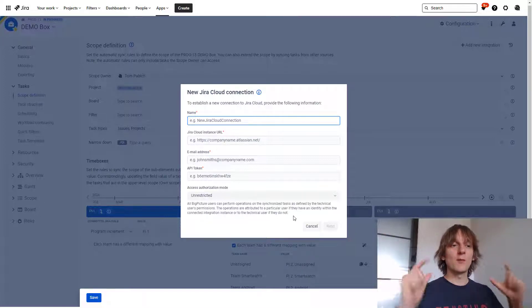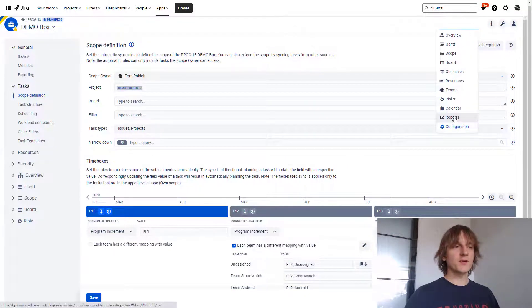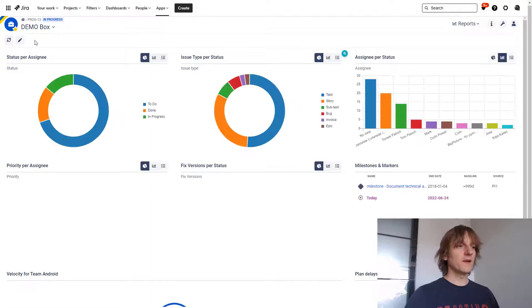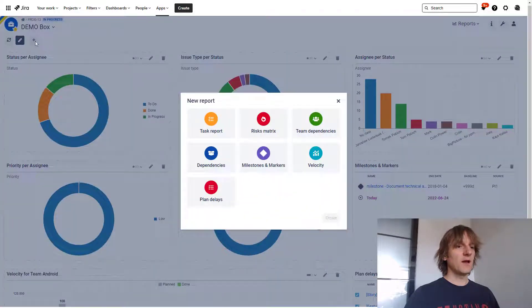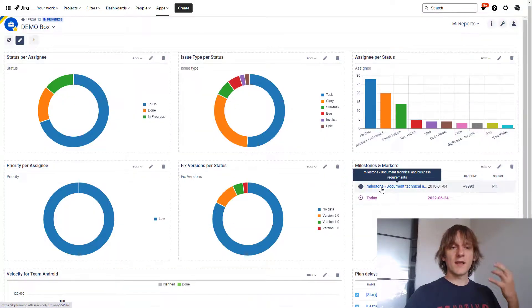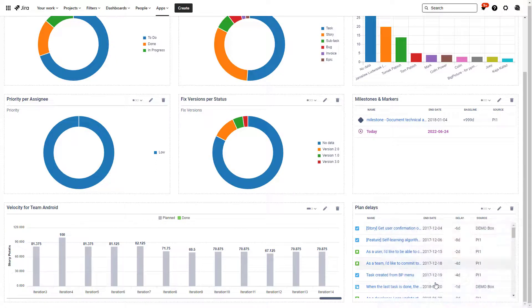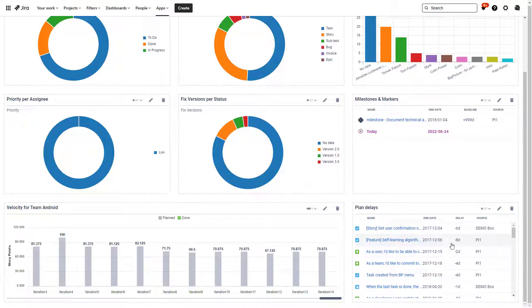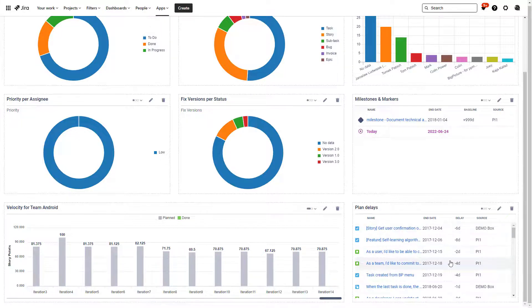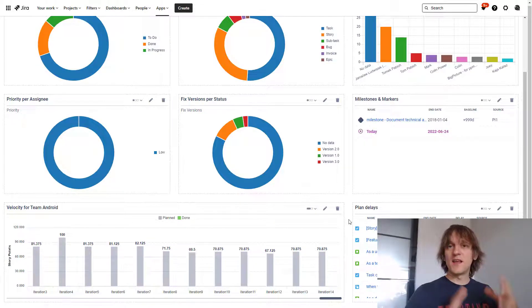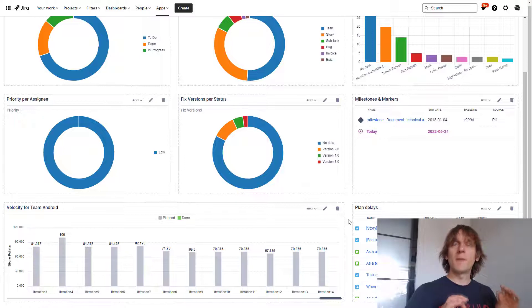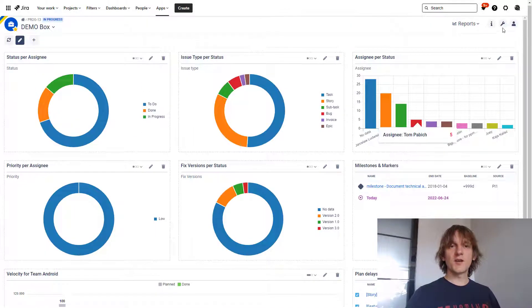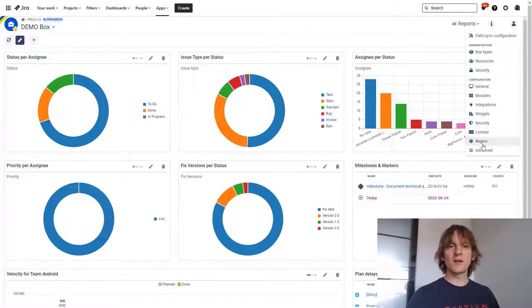Jumping next to the report section, you will find that there is a new report available over here. If you hit edit and plus, there is a plan delays report. It's available again for BigPicture enterprise users only. This is what it looks like. It basically shows you on the report screen over here the issues that are delayed in terms of their baseline end date, and you will be able to quickly find out where your attention is needed. It's not exactly the same as the delayed tasks on the Gantt, because the delayed tasks on the Gantt don't really rely on the baseline field, but this one does.